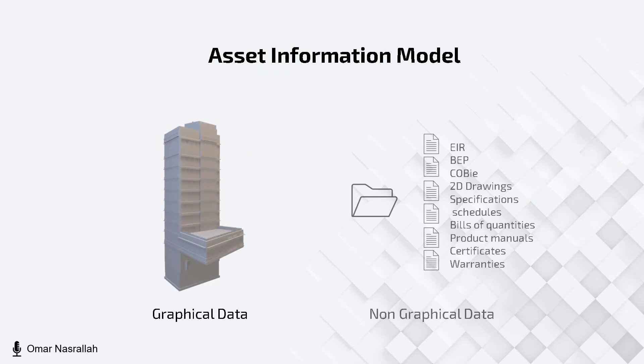The project is now over, and a smile on our client's face shows a high level of satisfaction. In this final stage — handover — we were requested to submit all documents related to the project, from graphical to non-graphical data. As part of the ISO 19650 information management framework, we submitted to the appointing party the final AIM (Asset Information Model). Alongside the AIM, we submitted a COBIE spreadsheet for the client's facility management team.